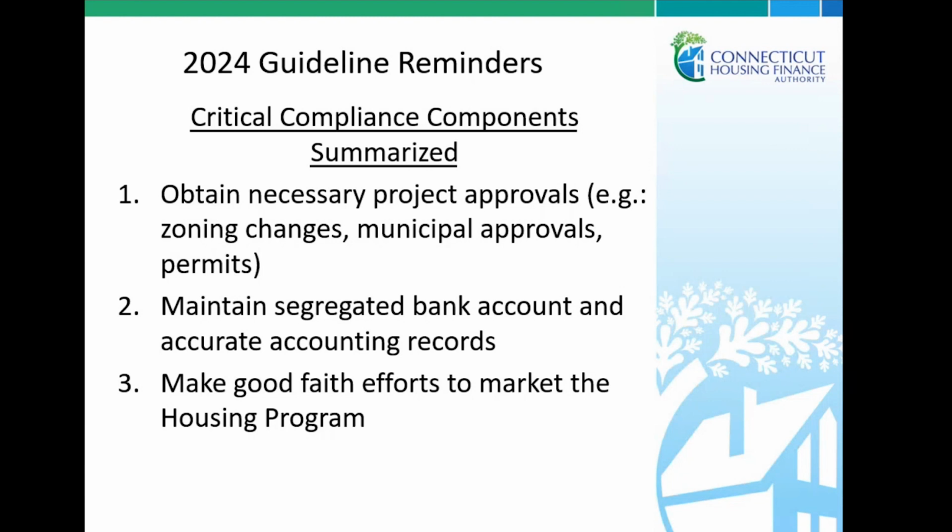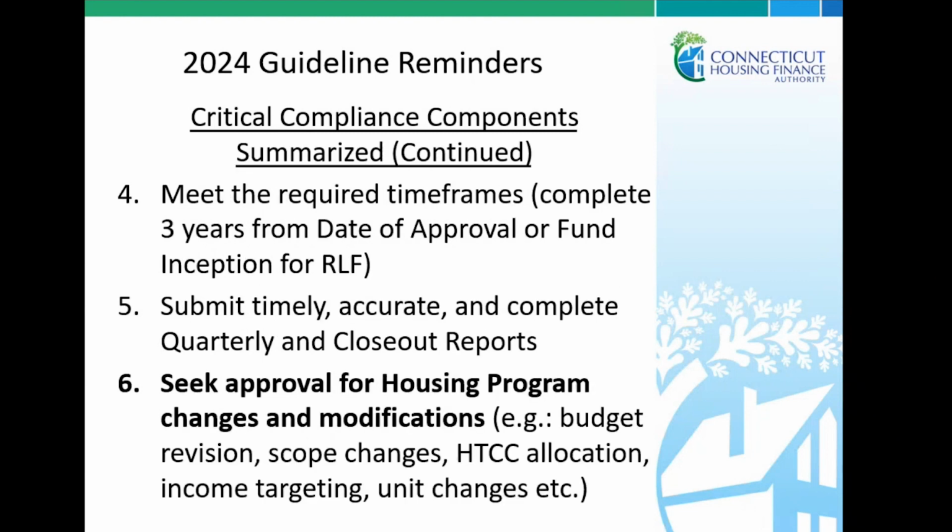You need to make good faith efforts to market the housing program, and you need to meet the required timeframes. It needs to be completed within 3 years from the date of approval. Submit timely, accurate, and complete quarterly and closeout reports.